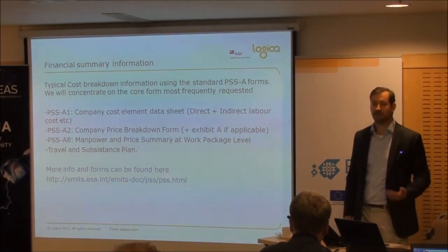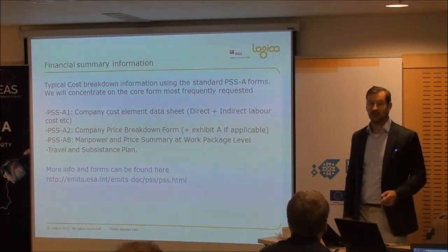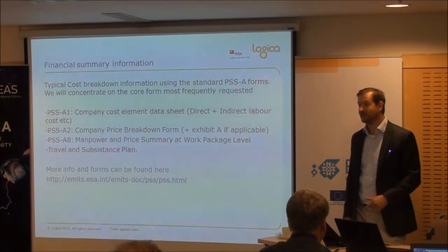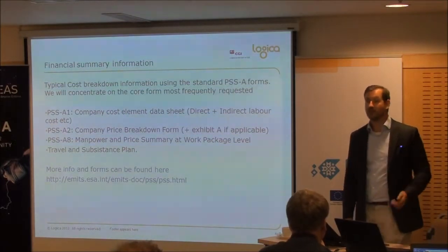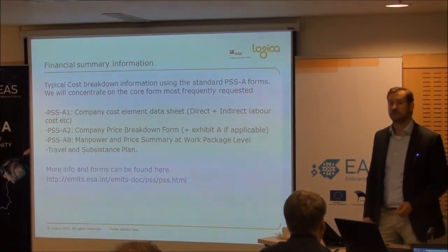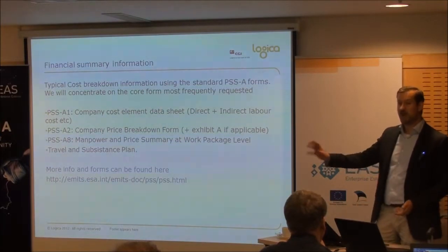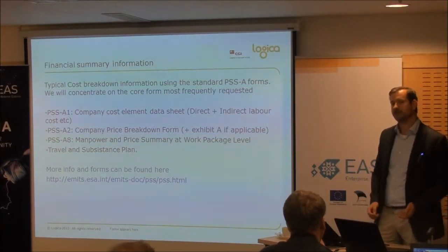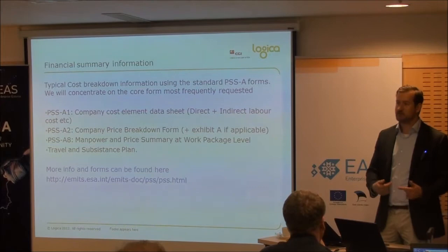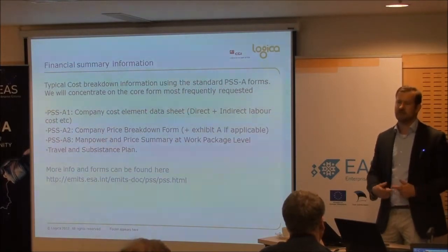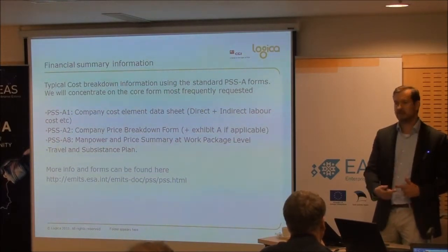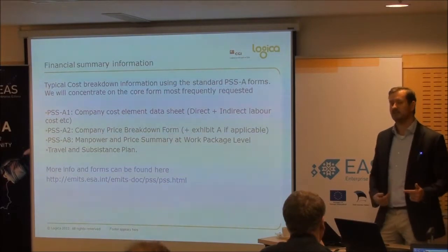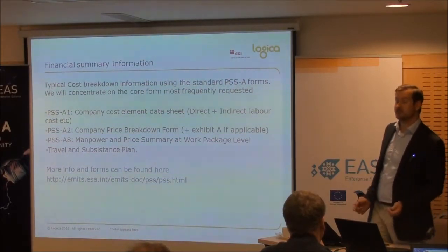Get their PSS forms, their costs, and the earlier you get them, the easier it is to negotiate with them. Because let's assume they come back and they're 3 times what you thought they were going to be. That's causing you a bit of a problem with where you overall expect it to be. So if you don't have the time to challenge them, to make sure the assumption of what they're doing is what you think it is, then you could price yourself out very quickly.